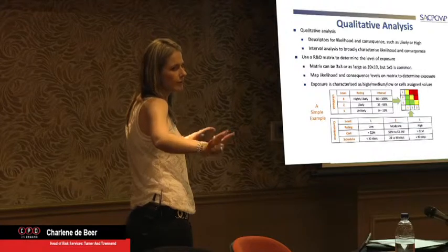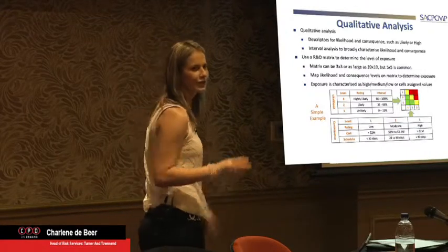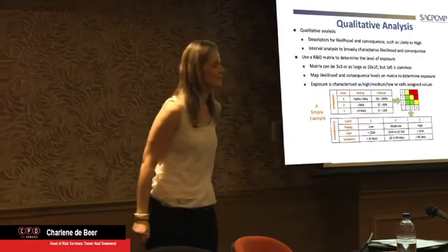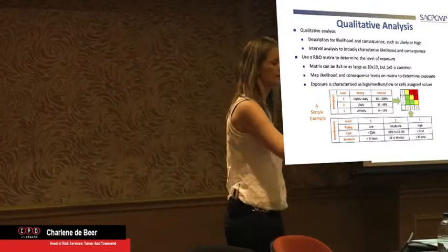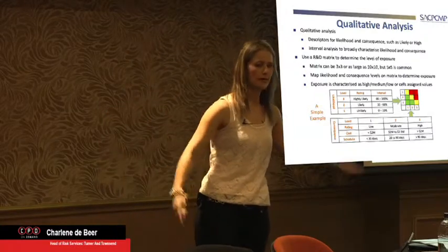All your risks would be 50-50. We'll all sit on the fence, and it'll either happen or it won't. So I've never in my life presented any project team with a 50% option. And it quite fascinates them. Sometimes they'll ask, what's the likelihood? They'll all go, oh, it's 50. I said, well, you don't have a 50% option. So you have either a 35% chance of it happening or 75.